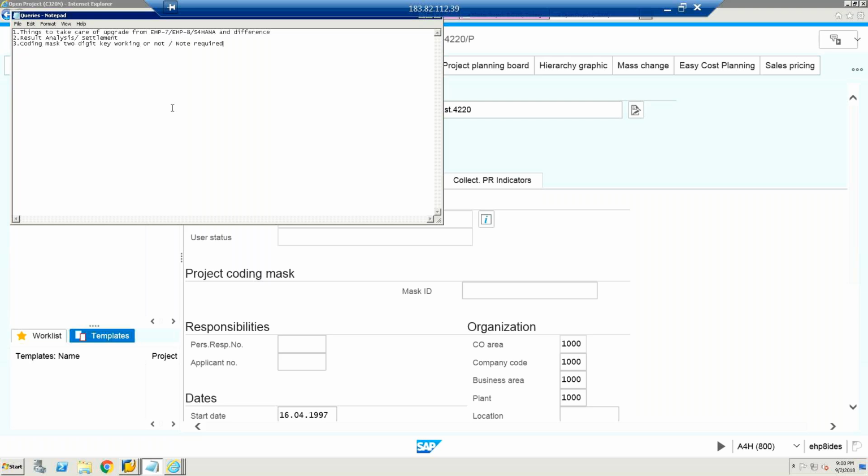Understood. Actually, your question, I think, is: if we are assigning multiple system projects to the master project, how exactly is it correlating between these projects, right? Okay, just think of an example. You are going to start a project, for example, planning to install one substation. Substation installation and commissioning, that is your master project. This master project itself can have multiple projects under it.